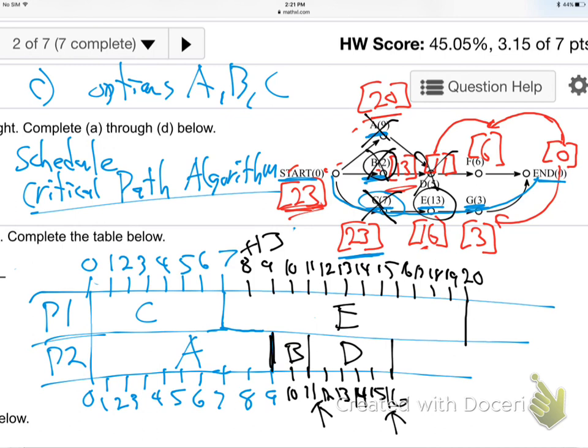If the map only says there's only one job even open, then I don't care about any of the decreasing time, critical path, whatever. Who cares? Just do that job. There's no choices. But if there's a couple of choices, then I go, well, which one should I choose? And then I go to the red bracket numbers, or if we're doing decreasing time, I look at the parenthesis numbers, or if we're doing alphabetical, or whatever they say to do. You only do that when you have options from the map. If the map only gives you one choice, you just do what the map says.